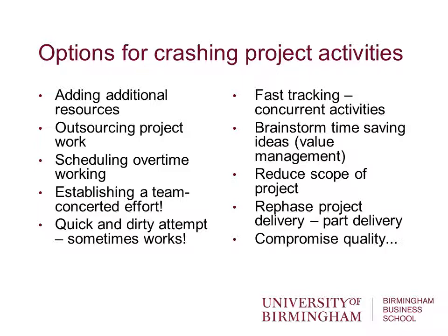We can outsource project work, which is an option for some projects. Outsourcing, again, is a cost increase, but it's getting someone else to carry out some of the activities. We can schedule overtime, again another cost, but it increases resource without having to increase our manpower for the project. We can establish a team concerted effort. Just everyone get on with it.